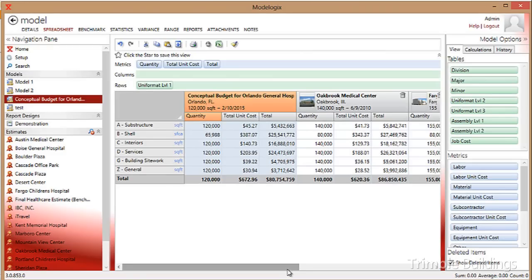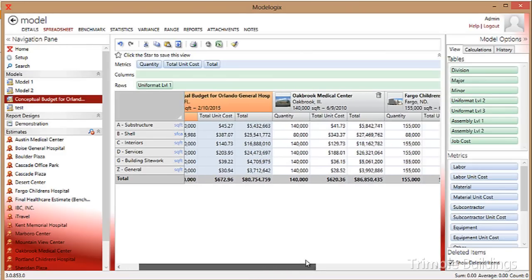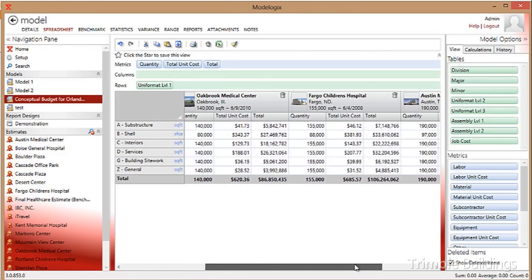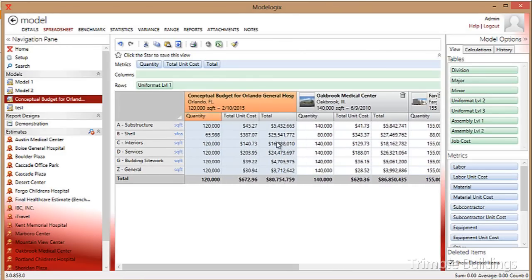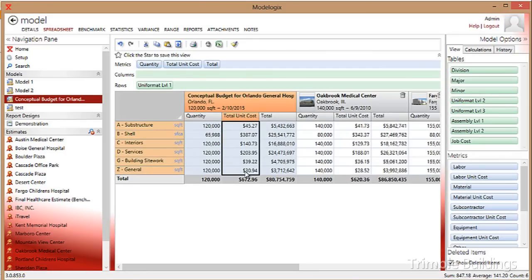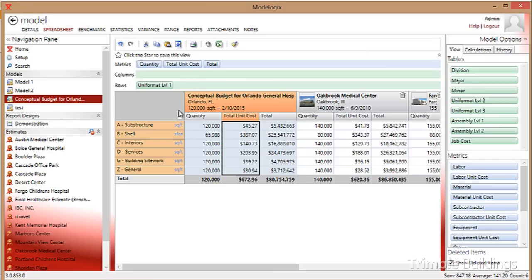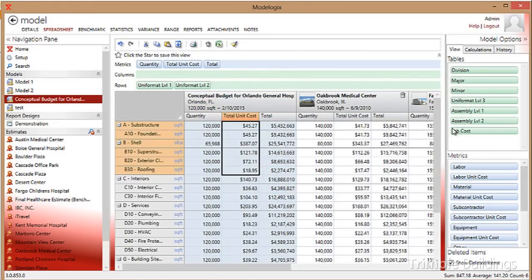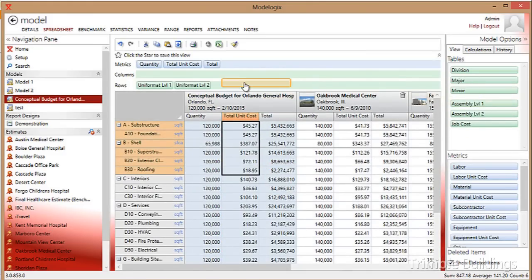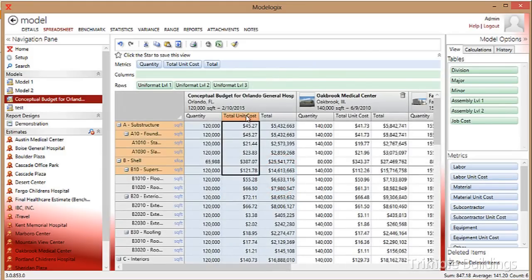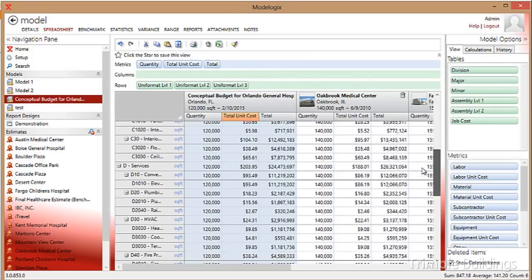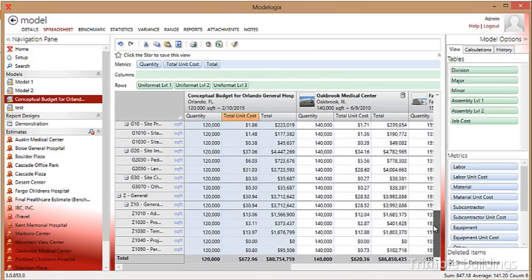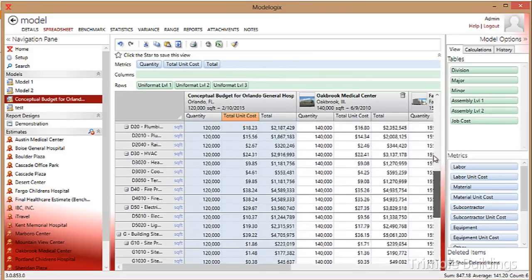To the right, I see the three projects that I selected to become the basis for that model. Now that I'm in the model, I can instantly see the average cost per unit across those three projects. I can analyze that cost by any work breakdown structure that a company deploys. For example, right now I'm looking at a very summarized system level view, uniform at level one. I can drill into increasing levels of detail simply by dragging the additional levels over to the row fields in the model itself. Now you'll notice I've gone from seven or eight lines of detail into a full blown cost model for all systems of Uniformat.